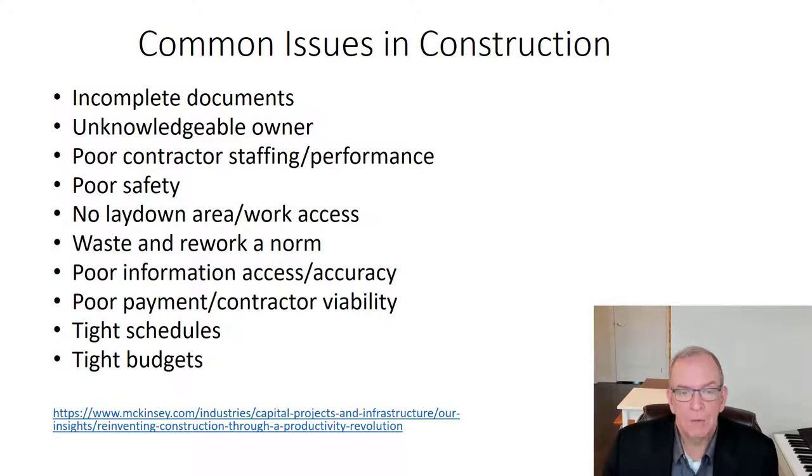Poor payment would affect cash flow and contractor viability. If you can't pay somebody because you weren't paid, then it has this trailing effect. The financial crisis of 2008, obviously, when banks were in jeopardy of failing and couldn't transfer funds when needed, would have had a ripple effect through the whole economy if that wasn't taken care of. Well, we run into that in construction when somebody doesn't pay a major contractor and the amounts aren't effectively monitored. There are also high expectations. Clients have very high expectations, which tends to lead to tight schedules and tight budgets. These are common issues in construction.